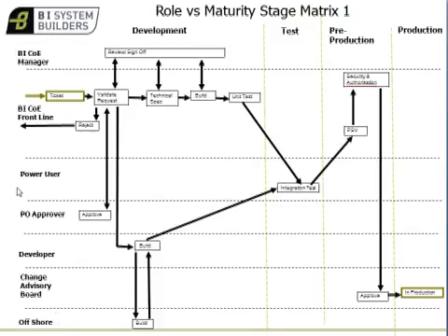In this example, a ticket comes in, the request is validated. It's already done, we can't do that, not enough information, it gets a rejection, asks for a rework. Okay, that's great, we have the information, send it up to the manager to review. It could go back through the cycle again to ask for more information, or the manager may require a technical specification, for instance, sometimes functional and technical specification.